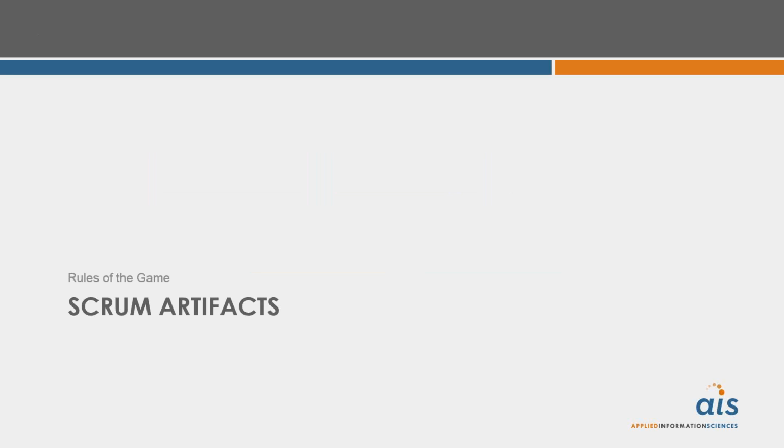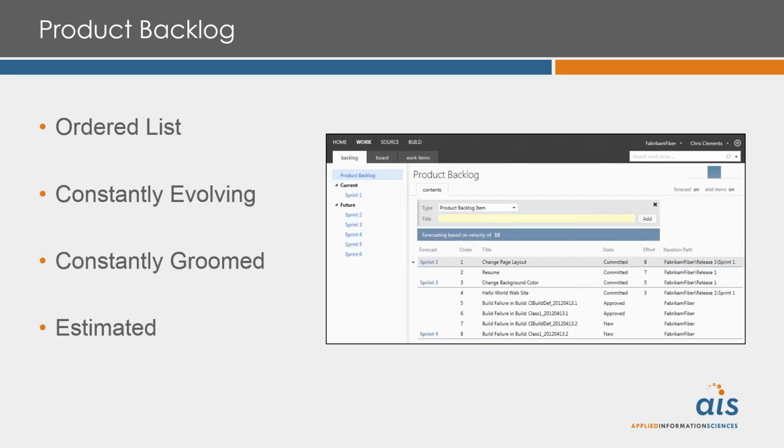All right. Let's take a look at artifacts, the things that we might produce or do as a part of Scrum. There's actually not very many. We talked about one of them, the product backlog. This isn't terribly complicated. It's actually a very simple concept in Scrum, unlike many other methodologies. It's simply an ordered list of things we want to do. And that idea that this is an ordered list, a simple ordered list, is actually very powerful. By requiring that things be stepwise, one on top of another, it becomes relatively clear which one's more important than another, as well as what part of what's going to be happening next. When we measure what we're able to do out of a sprint, we can apply that to this ordered list and do some really simple arithmetic to come up with forecasts. And you should be expecting forecasts.